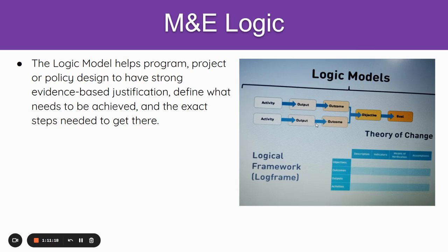And so we will need to collect data after the hand pump is constructed. We need to collect data on the usage so that when people are using the hand pump, we are aware of how many people are using it on a regular basis for certain period of time. Let's say we collect that data for 1 month or 2 months, so that within 1 month or 2 months, we can tell the number of people using it.